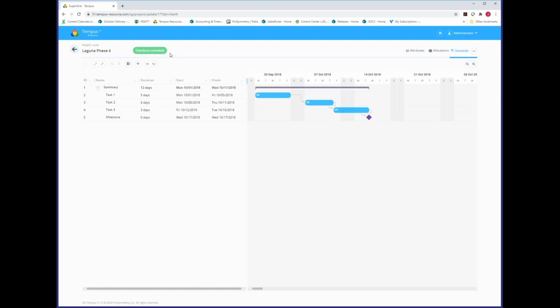Checkout is important. Unlike, for example, BPA flat grid, scheduling does not enable concurrent editing at the moment. There are future plans for a BPA-style scheduling interface where multiple schedules can be manipulated concurrently. That's a ways out, but definitely something we're envisioning and looking at to fit with our broader philosophy of enabling bulk editing of data. So something to look forward to. But checkout does occur, and it does lock the data from being edited by other users concurrently. So you would have to check out to edit and then check back in to persist your changes.